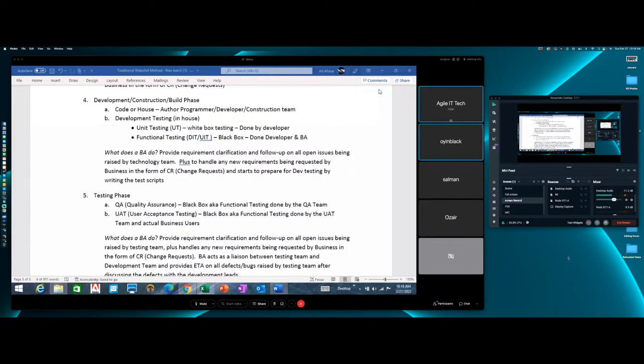Okay? And come Monday, if you don't get the code base from Ozair, you should come and talk to me and let me know, Ali, we are delayed with the start of our dev testing because Ozair and team are having some problems. And that's when I'll talk to Ozair. But this is good communication, you understand? Understood. Right? The last thing I want to hear is, I should have started testing 4 weeks ago and I still haven't tested. I'm going to blow a cap. You understand? Yes.